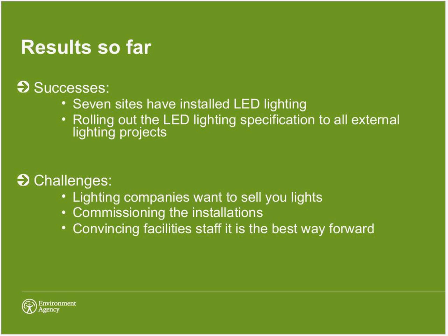As I said, the lessons we've learned have helped us to develop an external LED lighting standard for all our new external lighting projects. So we can get consistency in the way we approach this across the estate. Any new external fit and any new external lighting will be done to the same standard, which is useful for us. But some of the challenges, I guess, are that